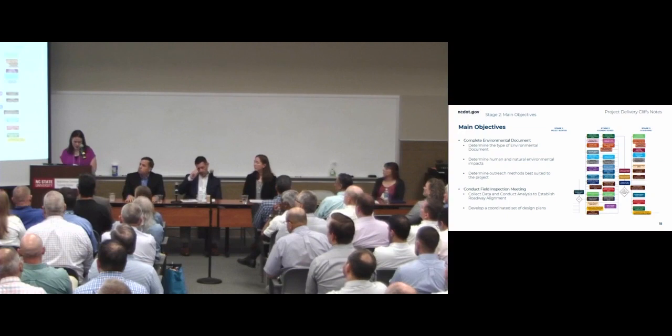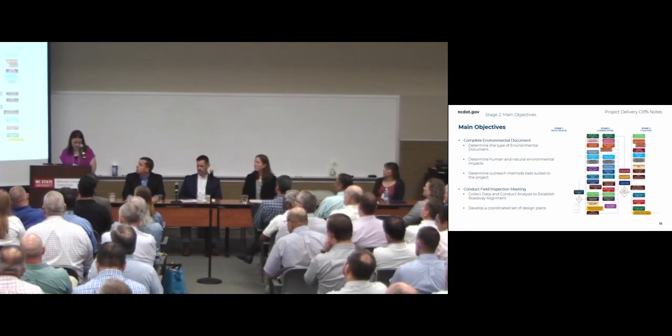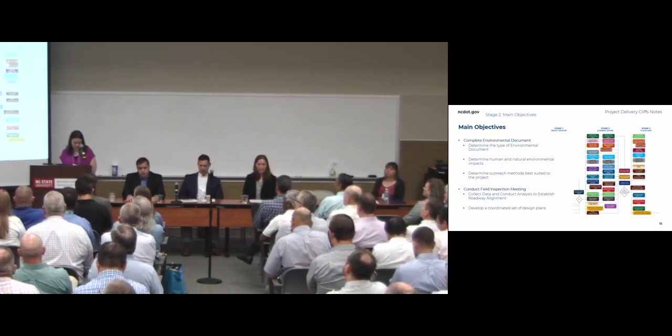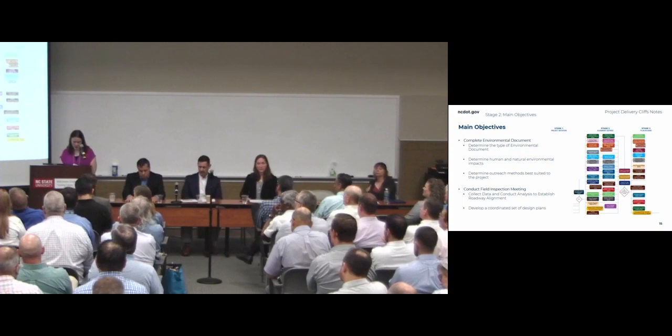The key is to focus on the things that your project needs. Is this a merger project? Is it federally funded? Does it have a rail crossing? Those are just a few of the questions you're going to be working through in this process. These questions should have been discussed earlier during your project scoping and kickoff. Remember, the type of document you have may have certain outreach requirements. A good resource to help with this determination is the statewide public involvement plan, which can be found online.